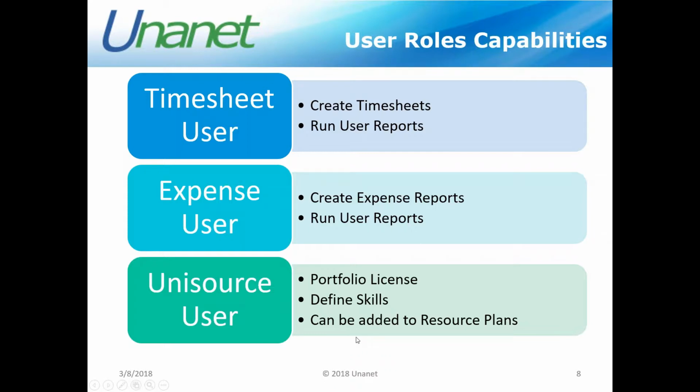And also, they need to have the Unisource user role if you wish to add them to your resource plans. That's the other big part of the portfolio license, is the capability of being able to plan your resources. And they would need to have the Unisource user role in order for you to have them available to you as you are doing the planning and creating those plans.